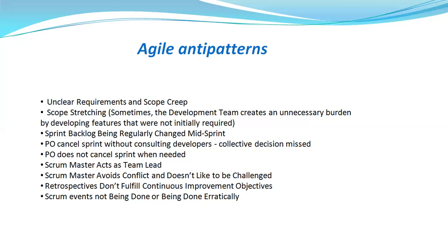Next, the sprint backlog being regularly changed mid-sprint. See, we can change the sprint backlog, but it may be due to the changing requirements of the stakeholders. But regularly, we should not change it in between the sprint. It's not a good practice to do so.